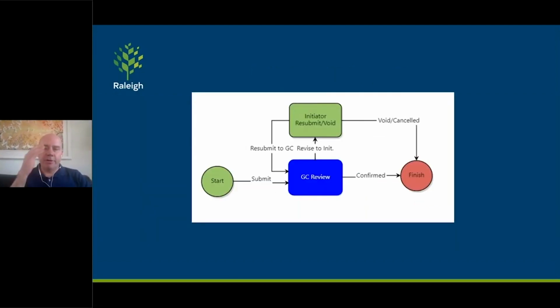Oh, here's another workflow example. This is our IDR, Inspector Daily Report, workflow. So the inspector, in the start step, fills out his IDR, marking line items for an active construction project for materials and quantity and cost that's being used that day. He'll mark that, and that's pulling from the line item from the commitment.